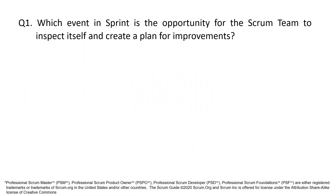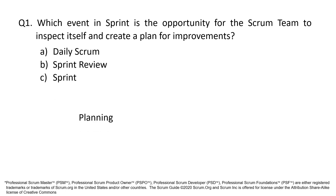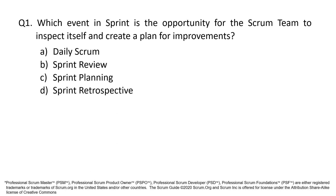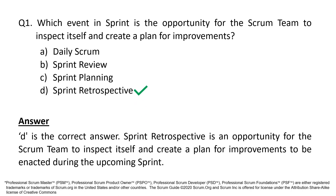Which event in Sprint is the opportunity for the Scrum team to inspect itself and create a plan for improvements? A. Daily Scrum. B. Sprint Review. C. Sprint Planning. D. Sprint Retrospective. D is the correct answer.